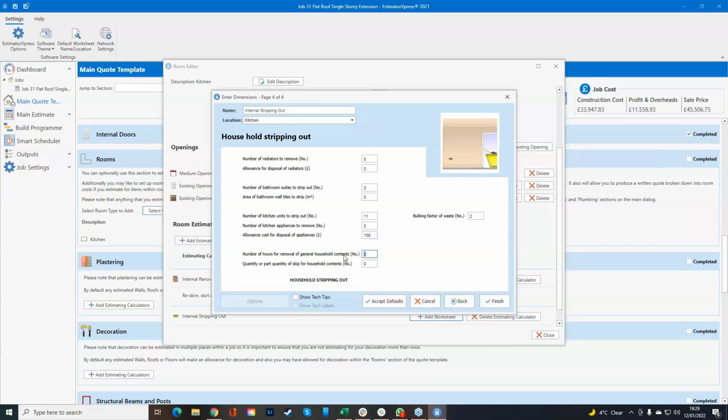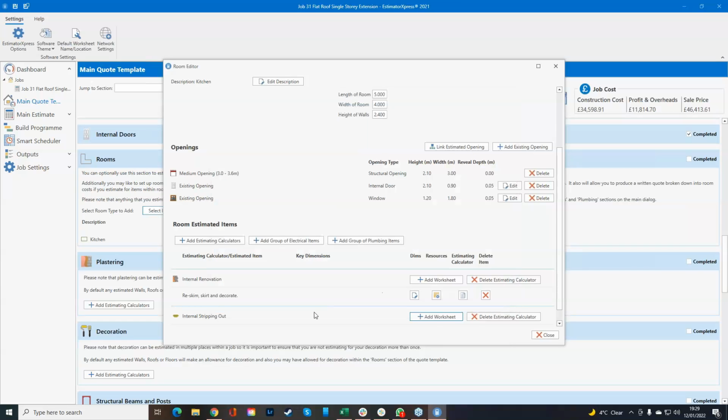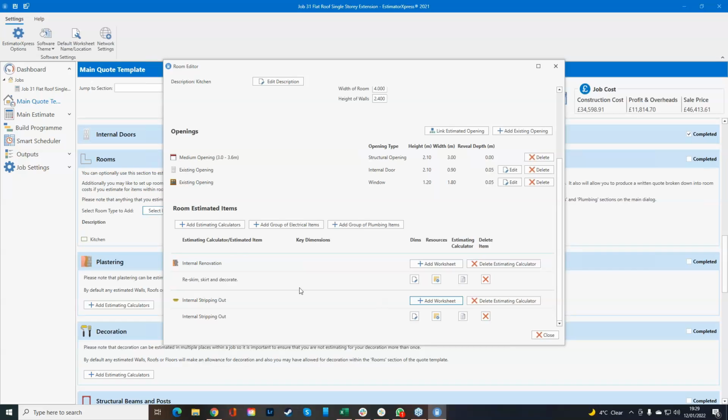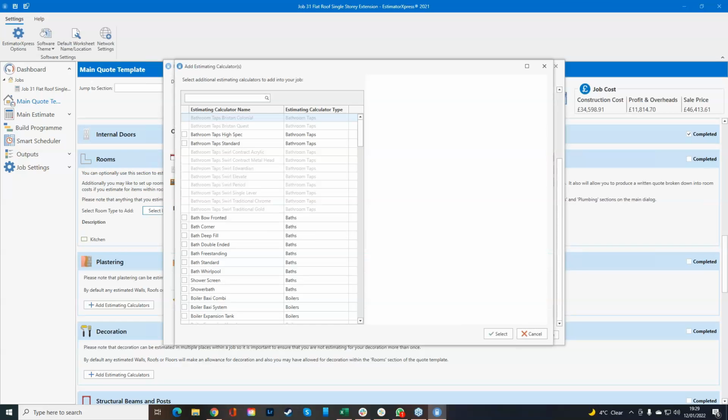So you're going to be working in, per guy is 8 hours for a day. So if you go 3 guys one day, that's 24 hours worth of work. So we've now got that. We've got a brand new reskimmed shell. We can then start going into the likes of